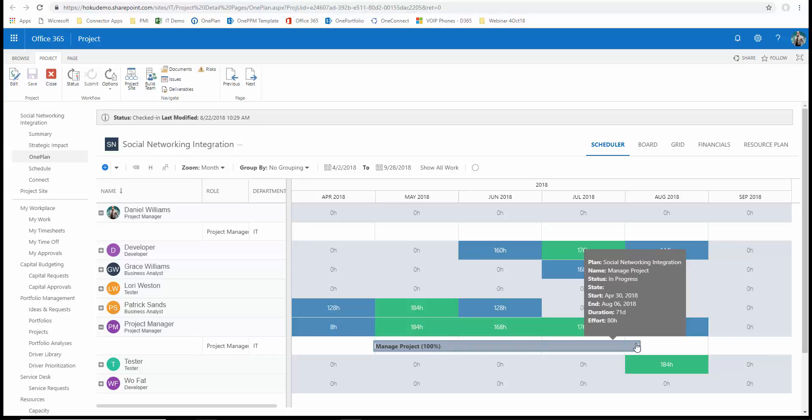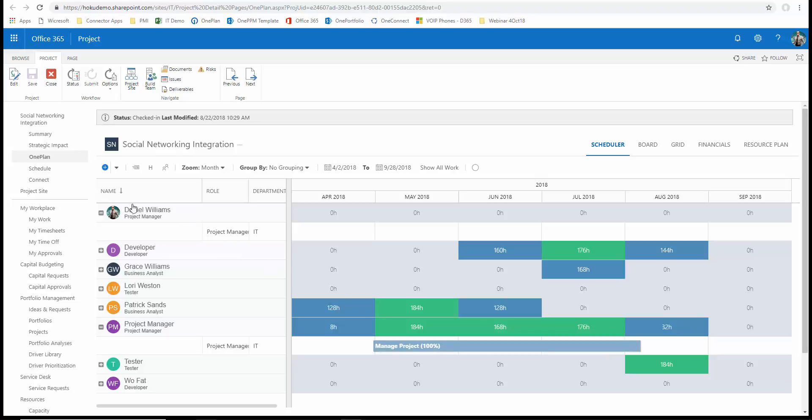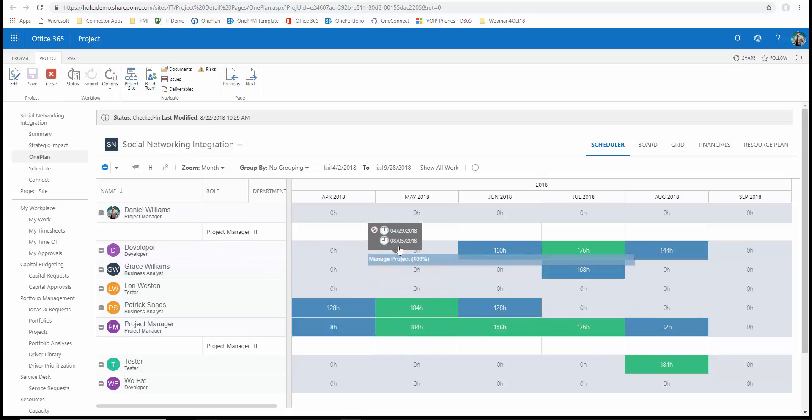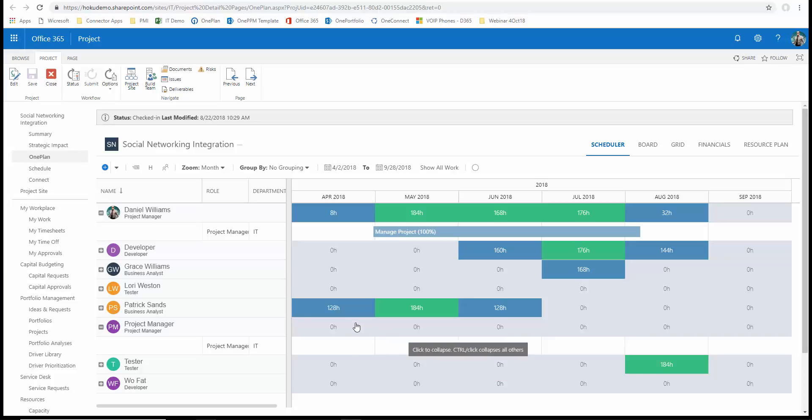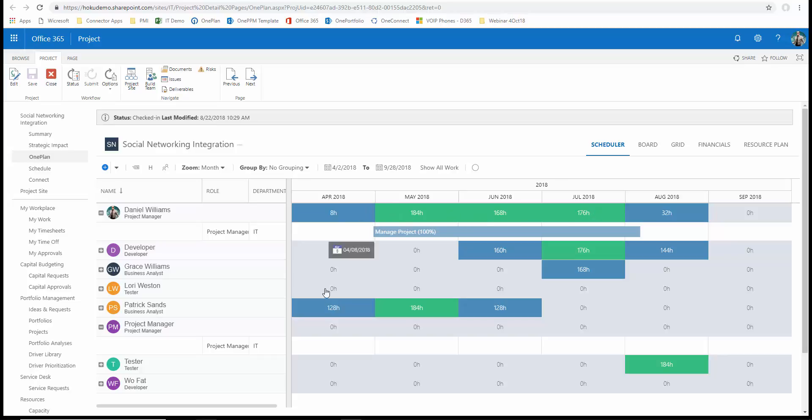Now, if we expand that project manager and see that ultimately this serves as a project request where we can then add a project manager to this project and allocate graphically by dragging and dropping this allocation to that project manager and thereby fulfilling the ability to get a named individual on here. Now, by doing so, we can actually see within this project with heat map, whether or not people are over or under allocated.